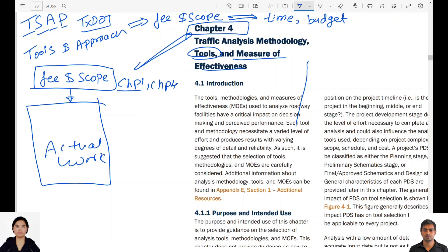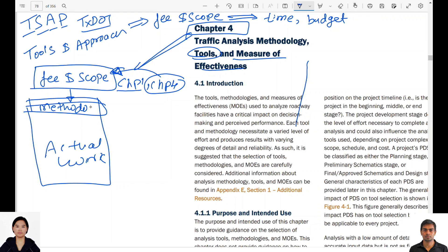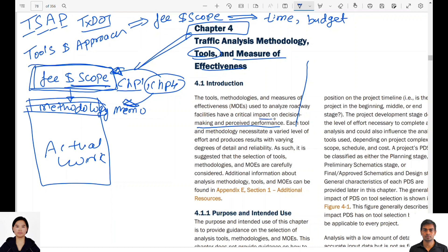Chapter 1, which is project scoping, is related to fee and scope, and Chapter 4, the selection of tools, is also related to fee and scope. After fee and scope comes the methodology memo and data collection. The importance of Chapter 4 comes from the fact that it defines how much fee and budget we will have, what is in scope, and what tools, methodologies, and measures of effectiveness meet the requirements of the T-SAP manual.